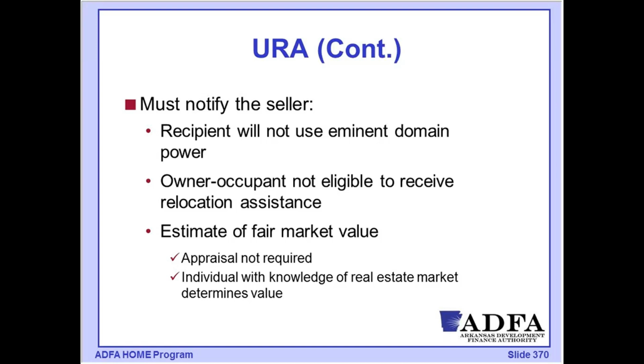It will also notify them that owner-occupants of those structures are not eligible to receive any kind of relocation assistance because they are voluntarily part of this process. There also is a requirement that they be notified, as part of this notification under URA, of what the estimate of fair market value is. We're making this assumption that they might not be well informed of what the actual value of the property is.